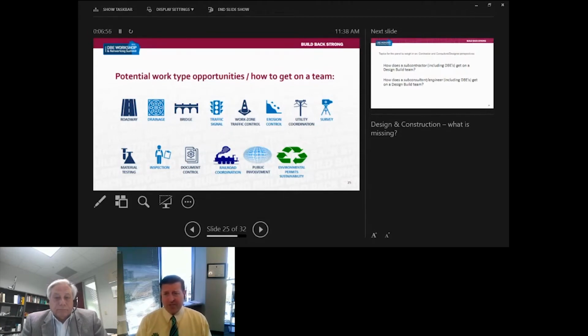Some of the projects we chase, which corporately are sometimes determined to be mega projects, we will add additional companies to do the bridge work, even though we can self-perform it, to help with schedule, help with resources, that type of thing.